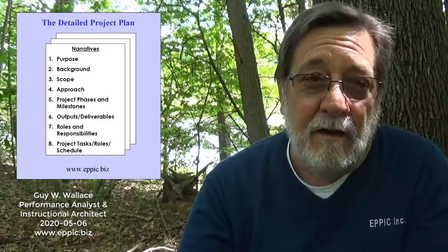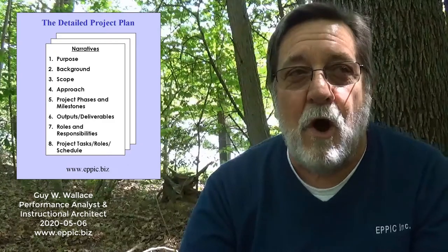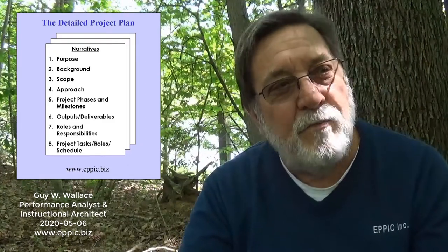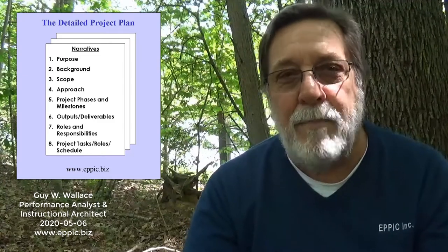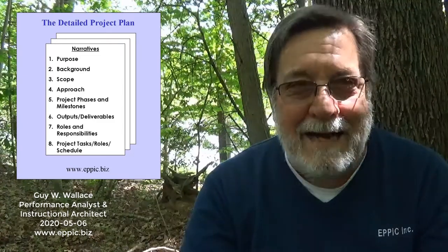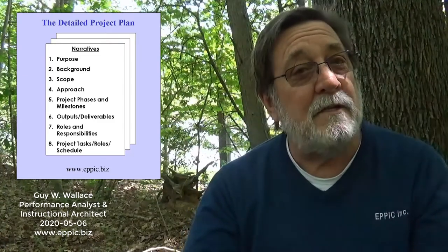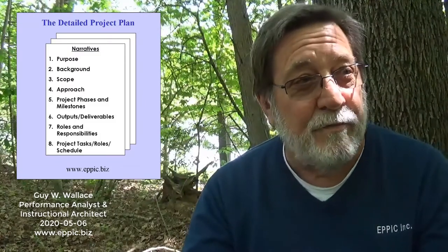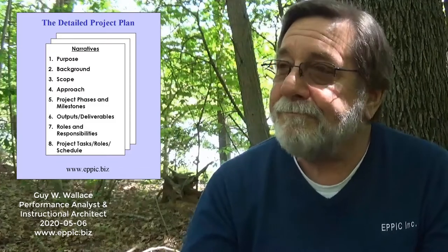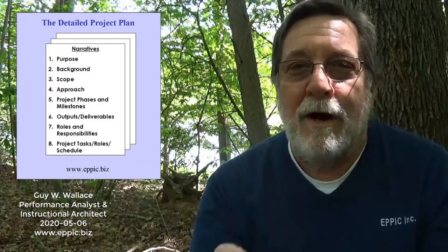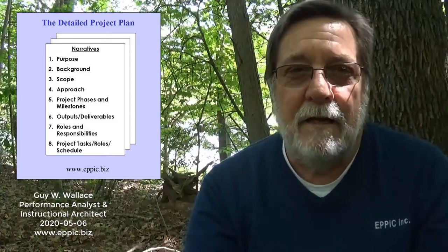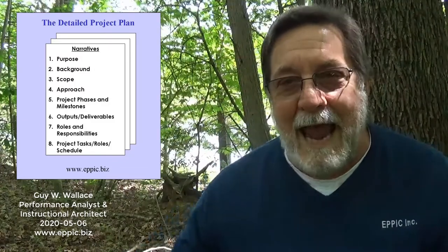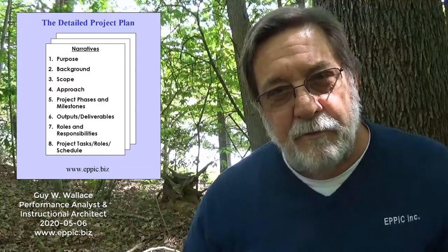The next section of this is really important. This is the scope. And one of the things that I learned over the years is this is just as important to describe what's not a part of the project, which is what's not in scope, but might reasonably be assumed to be in the scope, which is always dangerous, that assume thing, as most of us know. So what are we targeting? Specifically, target audiences and their realm of tasks or the processes that this was going to address.